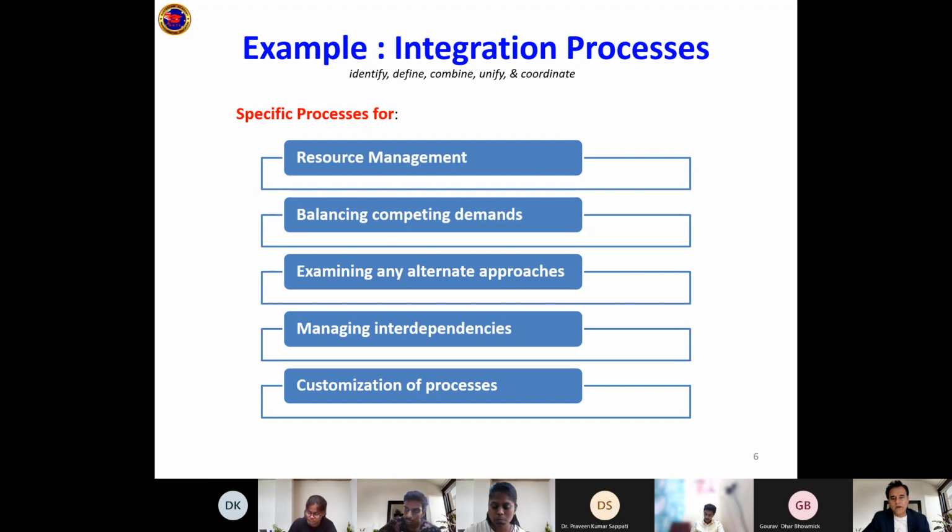So the process 1 will be report normal, routine, repetitive reports. Okay, routine and repeated reports. Every month, the same thing is being reported, how much you're progressing. Then you will customize the process and say, by the way, I will customize and include another process called the process of informing or reporting incidents and accidents.